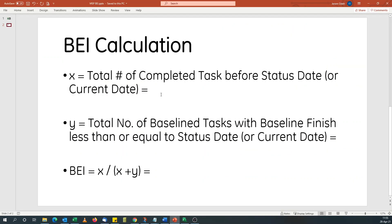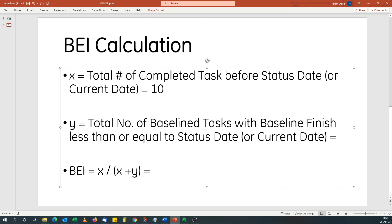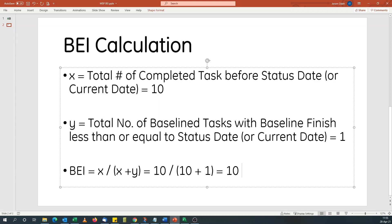My X is 10 and my Y is one. So if I come here and do X is 10, Y is one. This formula should be 10 divided by 10 plus 1, which equals 10 divided by 11, which should equal 0.91.